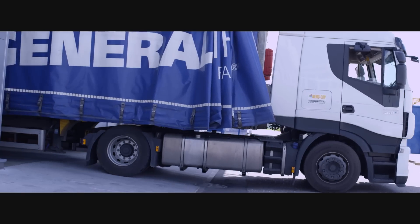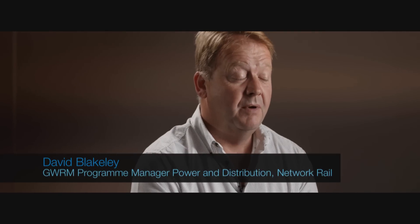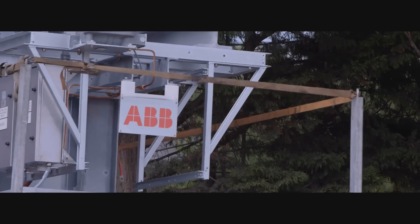If the pallet leaves this factory it's fully tested and it's ready to energise. ABB captured the programme and all the equipment was delivered to the schedule first envisaged. Our product allowed them to reduce their installation and commissioning time by 30%.